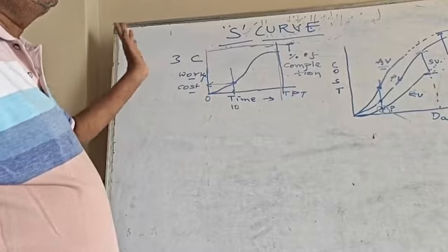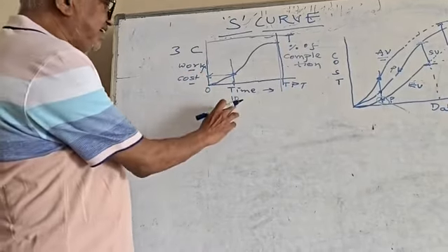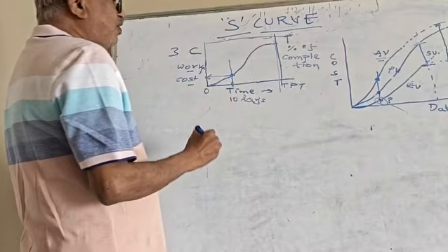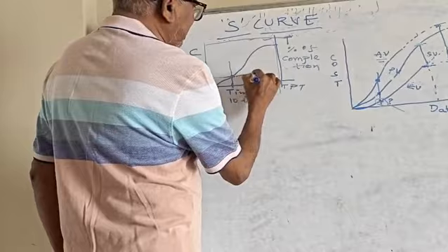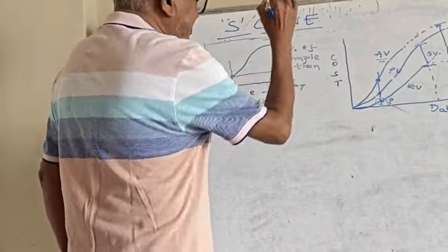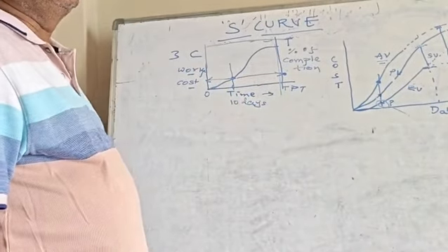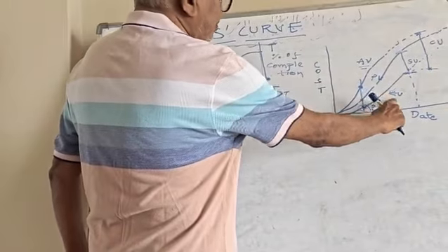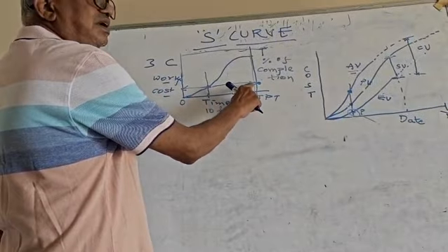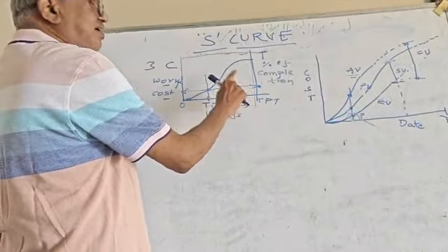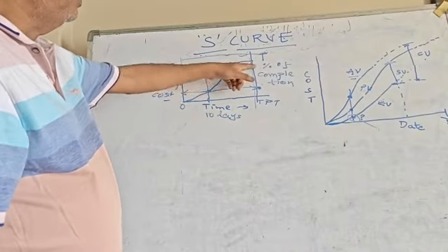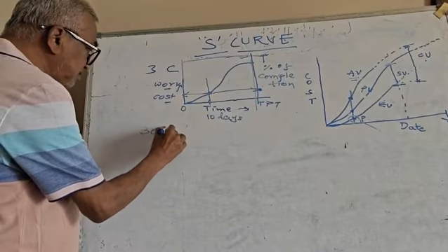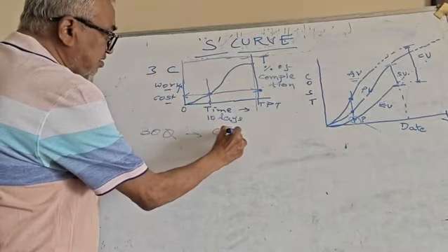When you see this side y-axis, you will get it on this date, say after a period of 10 days. Now if you take the same here, you will know what percentage of work has been completed, or what percentage of money has to be released. That is nothing but EV. So this particular point will tell you how much cost the project has earned. That means how much percentage you will give. You have it through the BOQ, the values, the costing.